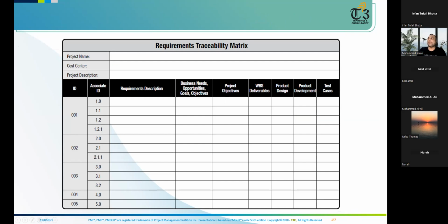And here we said that we will write a requirement and we will write down the test cases in which conditions it will be approved. So acceptance criteria. Every requirement must have acceptance criteria. Similarly, in Agile, every user story must have acceptance criteria. Without acceptance criteria, we will not add them in the list. Because adding something which has no value, you will only add to your work, nothing else.